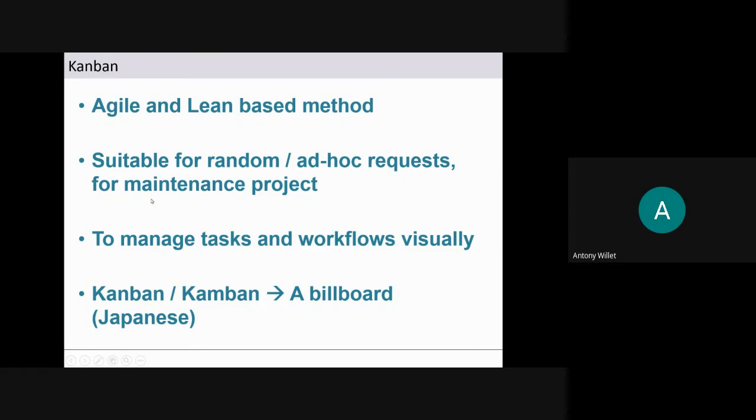For that, Scrum cannot be used because Scrum is an iterative method. For each iteration, at least 2-3 sprints ahead, we should know what we are going to work on. This is not the case in this scenario, right? We'll get random ad hoc requests from the customer. So Kanban is more suitable for that scenario.